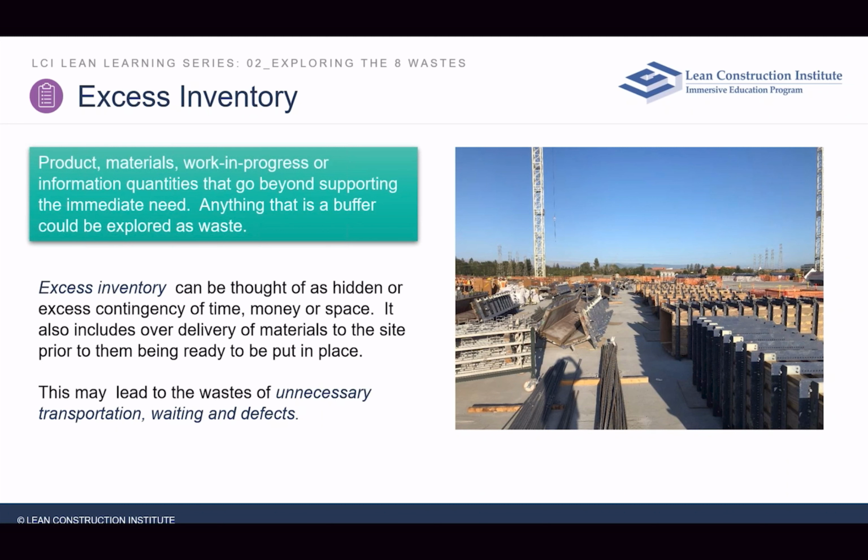Because now I've freed up 2 laborers for 2 days, not moving drywall, to do something more useful on this project site and more valuable to the end customer. Moving a pile of drywall around is not valuable to anybody. We're just creating extra work because we have this idea of excess inventory.